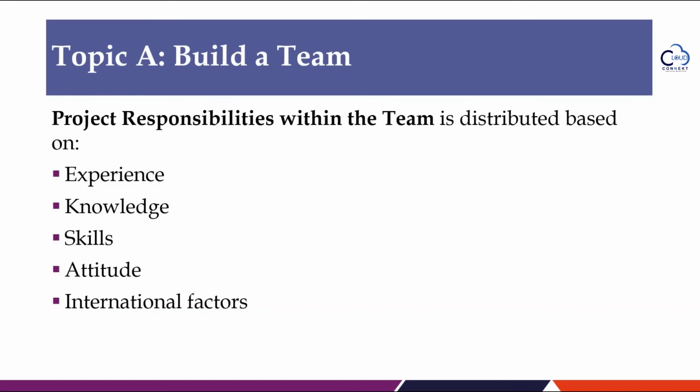During a new team formation, you should have a discussion with the team about the project's goals and objectives, the responsibilities of the project team, and the expected alignment of the responsibilities against team roles and skills. In a more agile approach, the teams will self-organize by assessing the work requirements and deciding how and who will perform the work to meet the team's objectives. More traditional approaches may involve assignments of work activities to specific team members as part of an overall work breakdown structure. Open communications and effective collaboration are critical regardless of the specific project management method chosen.